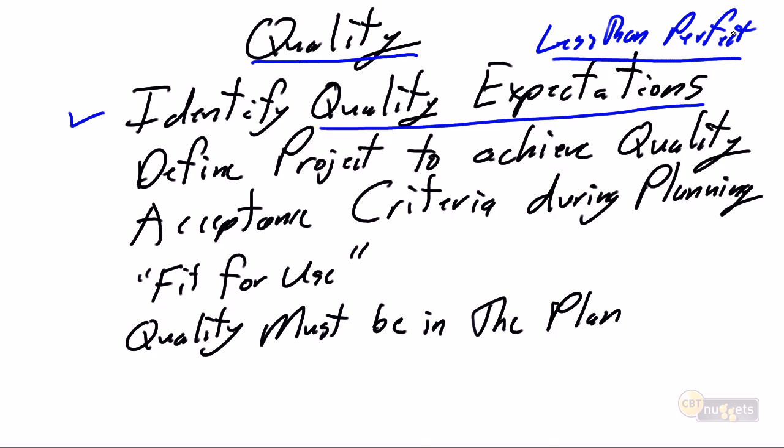That's a flaw. That's a less than perfect. Are we going to tell them, I will not buy your house because this piece of baseboard is missing? Probably not. If we're truly tolerant, we're going to just sort of say, well, I really wish it was there, but it's not going to impact my ability to enjoy the house. I'll accept it as is. Or probably more appropriately, we're going to put a conditional acceptance in. I will continue to inspect this home. I will continue to accept and sign off on moving in, but you must fix that. You must get a carpenter in within the next 5 business days to replace that piece of finish.